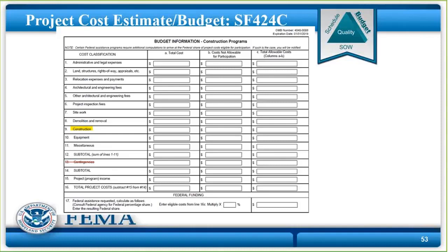Our grants people tell our tribal and state grantees that they have to monitor every cost line item in the project. So if you put 2x4s as a cost line item and bolts and nails as another cost line item, they are going to ask for documentation of how many 2x4s and how many bolts and nails were used during this quarterly period for which you are submitting a reimbursement request. You do not want to have to do that. You just want to say, we spent $17,483 on construction costs this month. That's what you need to know, okay?